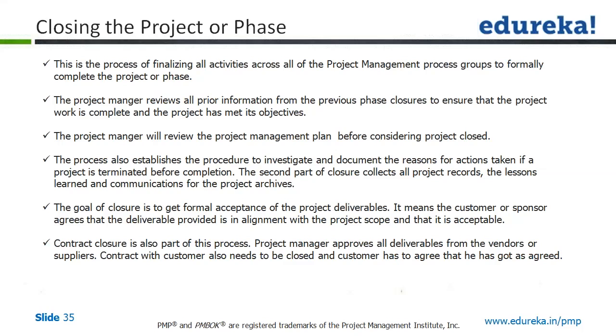Now, another item you should look at is that the purpose of the closure of the activity is to get the formal acceptance of the project deliverables. That means if I was supposed to hand over a product to a customer, that's the stage wherein the product gets handed over, and acceptance from the customer is taken into account. And once the customer accepts the project, it is assumed that whatever scope and schedule we agreed, we are well within that scope and time. The customer is accepting what is in line with, and in sync with, what has been agreed.